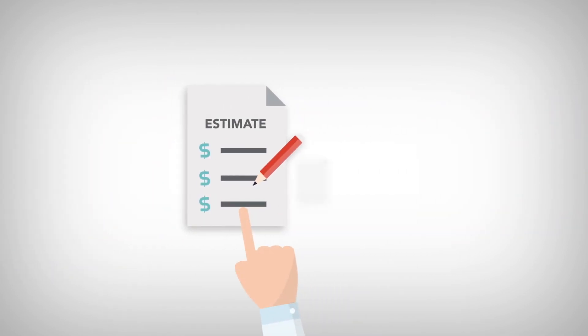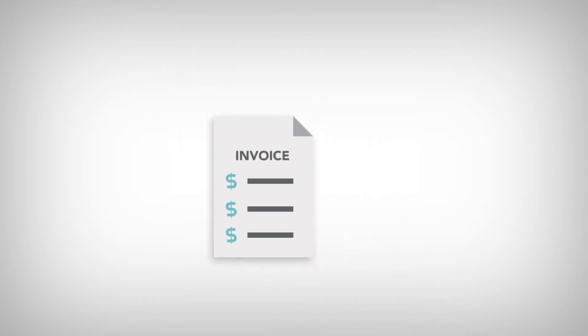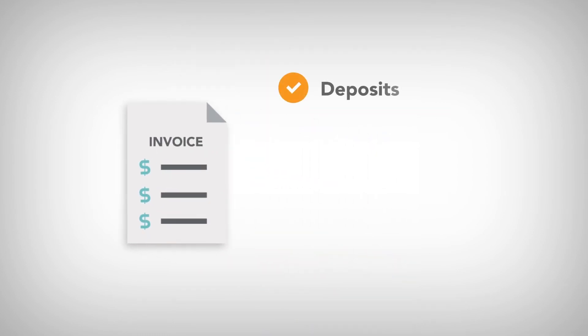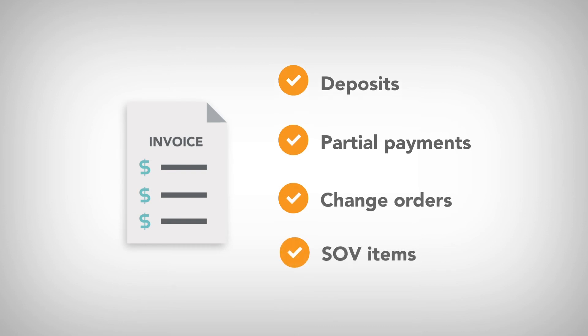Generate accurate invoices that include deposits, partial payments, change orders, and schedule of values items.